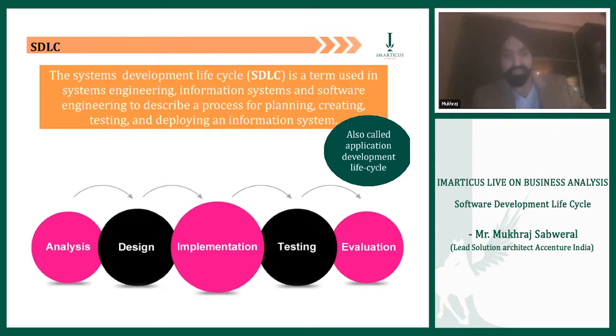So this whole analysis, in terms of cost, benefits, risks, and challenges, is all going to be done by our diligent business analyst, Rajesh. Rajesh typically may spend 10 to 15% of the project timeline in doing this analysis part. For example, if it is a 1,000 mandate project, Rajesh typically gets about 100 mandates to do this kind of analysis. The analysis, guys, is very deep. It's very, very evaluative in terms of arriving at 5 to 6 different answers.